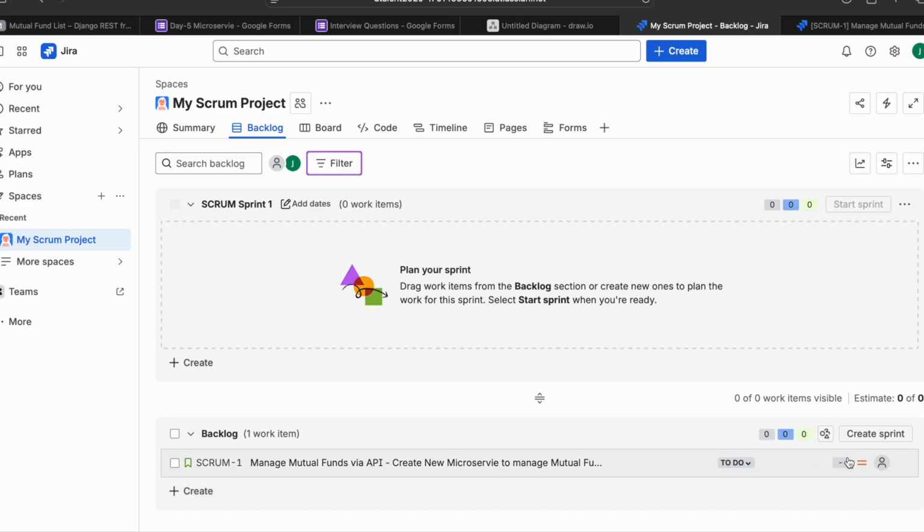So during the product backlog refinement, PBR, you can first discuss what is the purpose of this microservice creation, and there will be dependencies like database creation. There will be some other dependencies, setting up the project structure of the microservice, right? So health check, establishment of health check, and after we do all the groundwork,